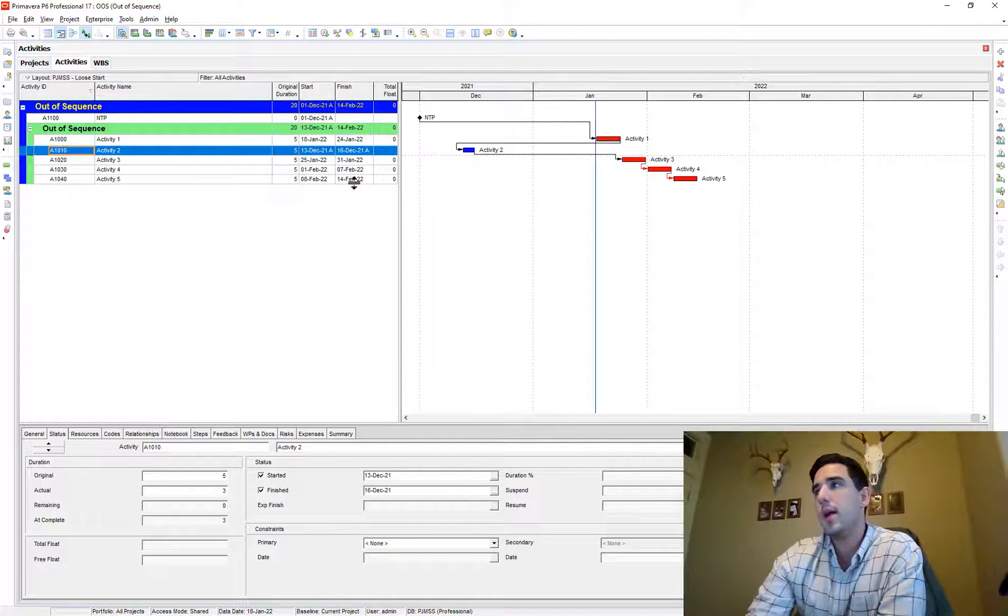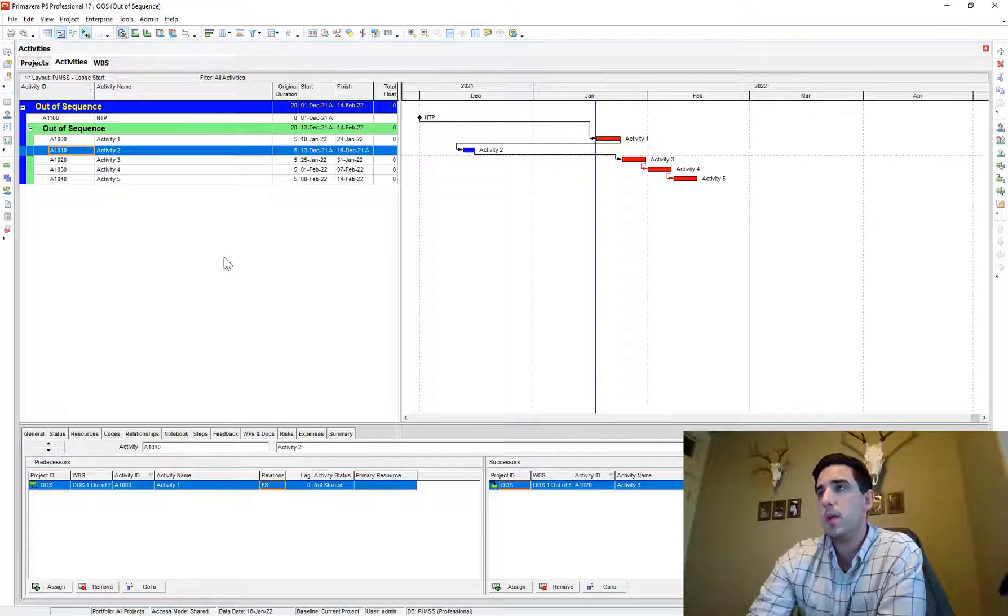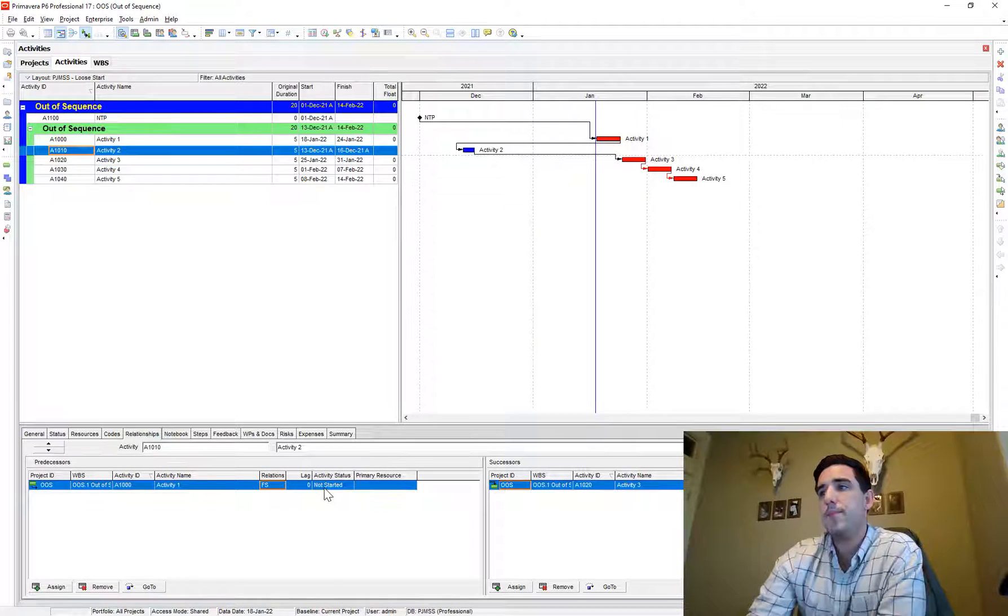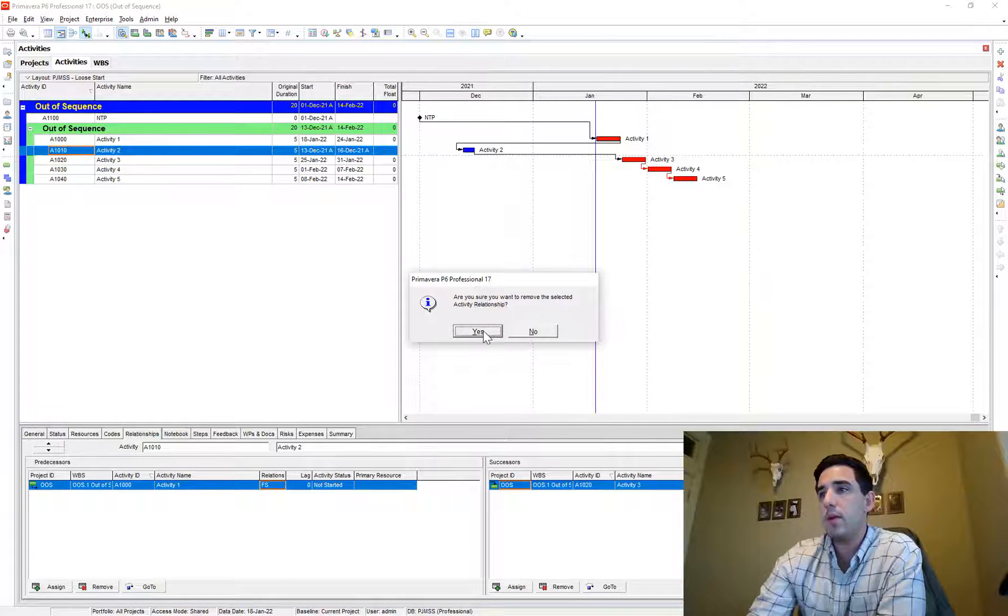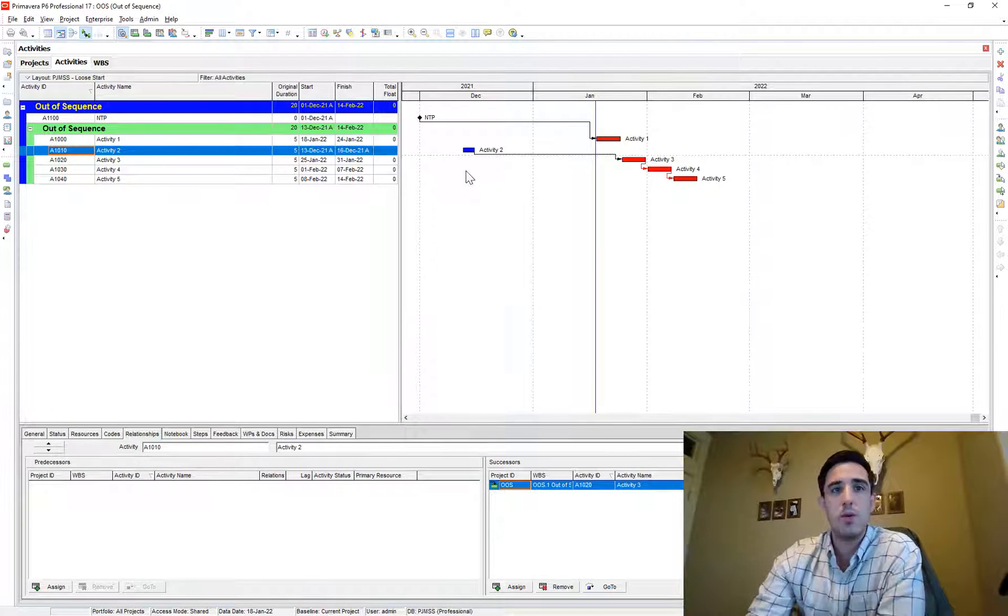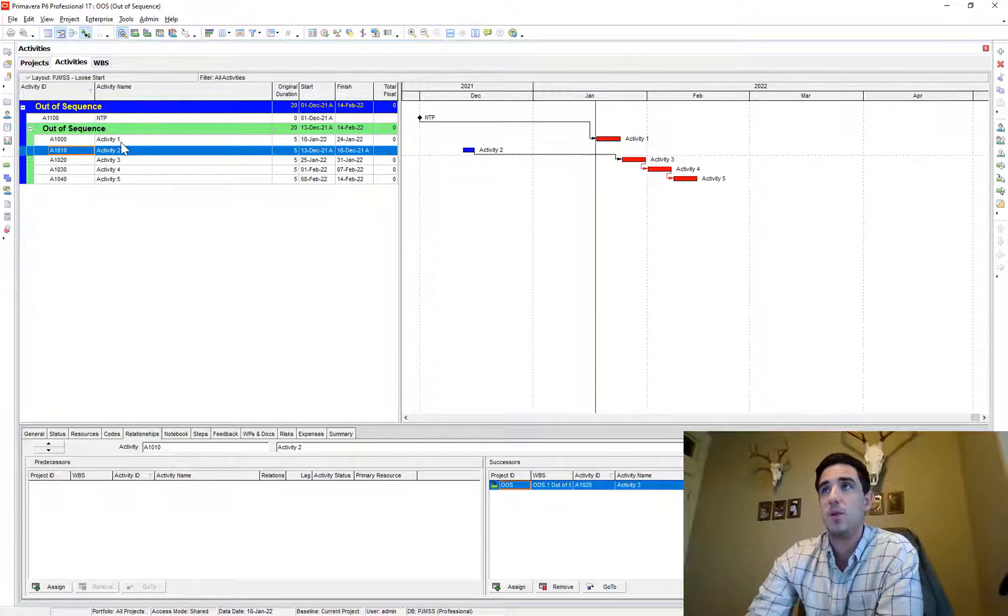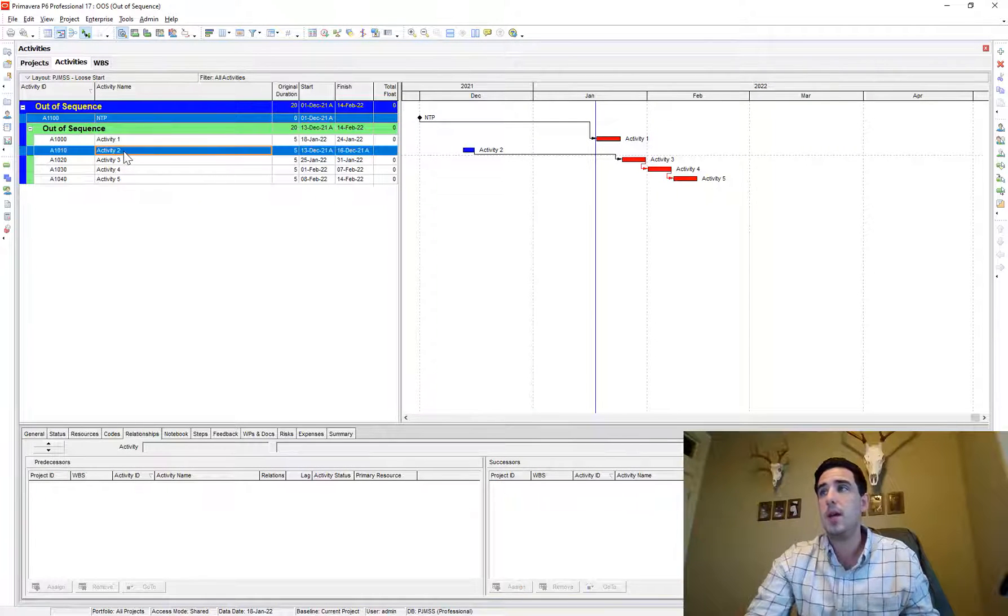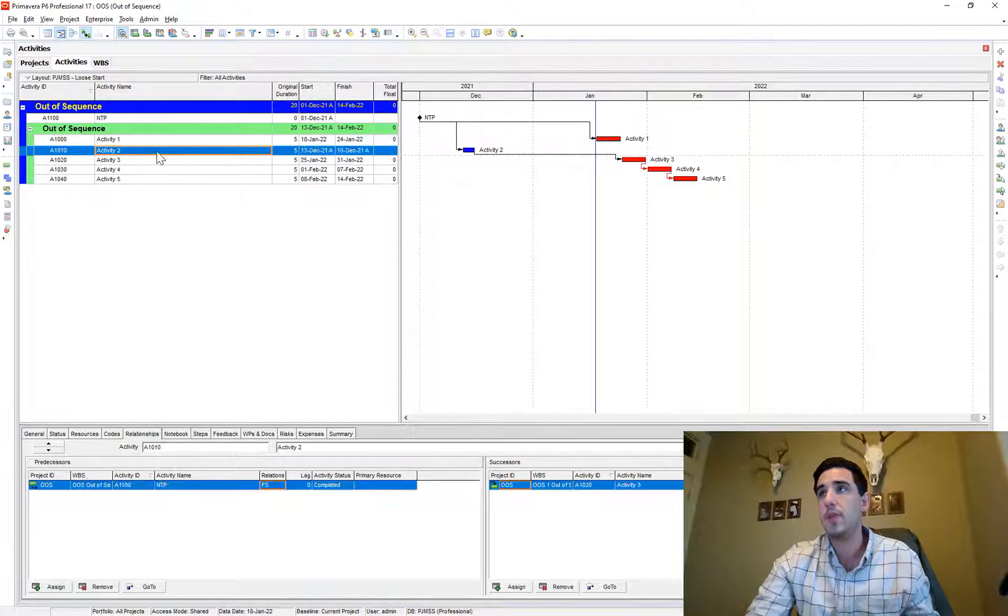And then I'll go and I'll correct that one instance. So the way that I would do it in this case is I would see, all right, this relationship is completed, but its predecessor is not started. So therefore I have to break that tie. And so maybe I remove that relationship and I'll tie it to a logical predecessor that maybe makes more sense than that activity one. So in this case, maybe it's the notice to proceed and I'll instead tie those two activities together.